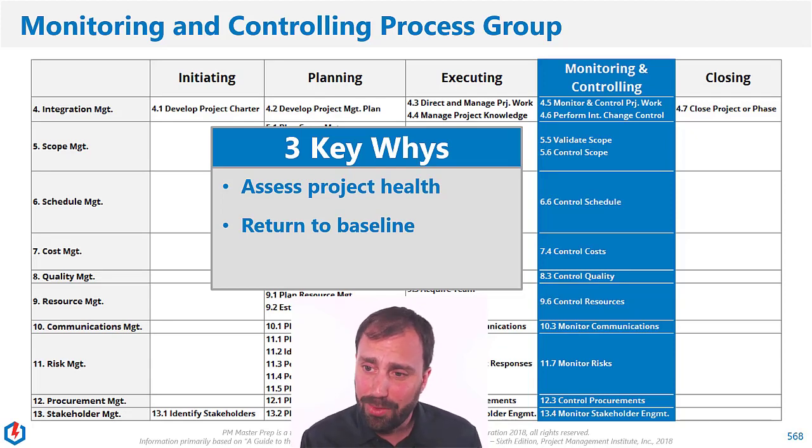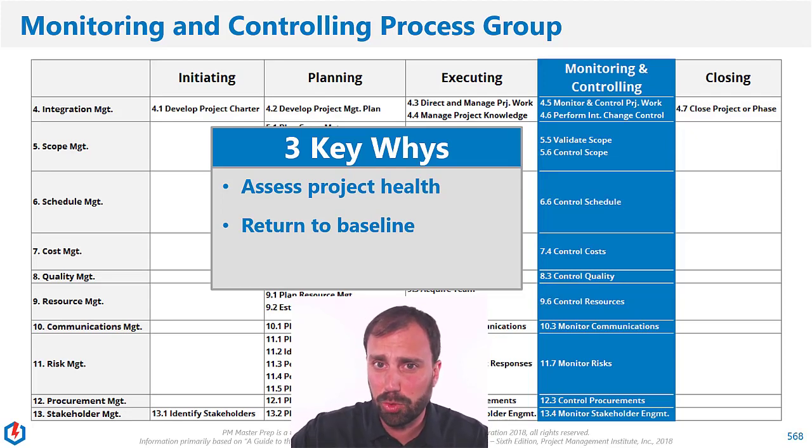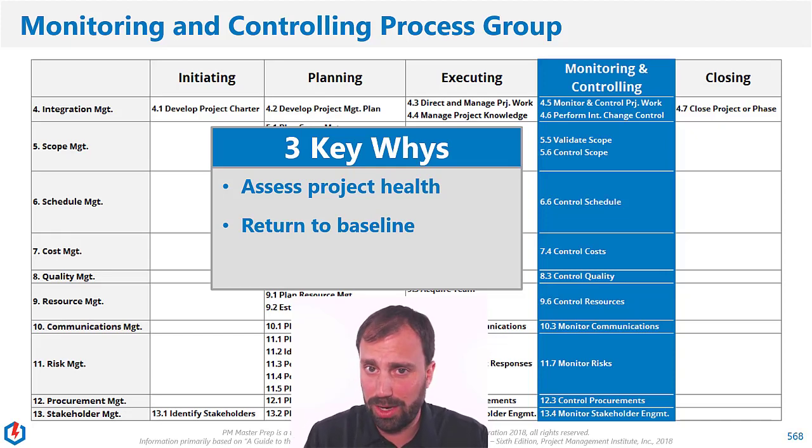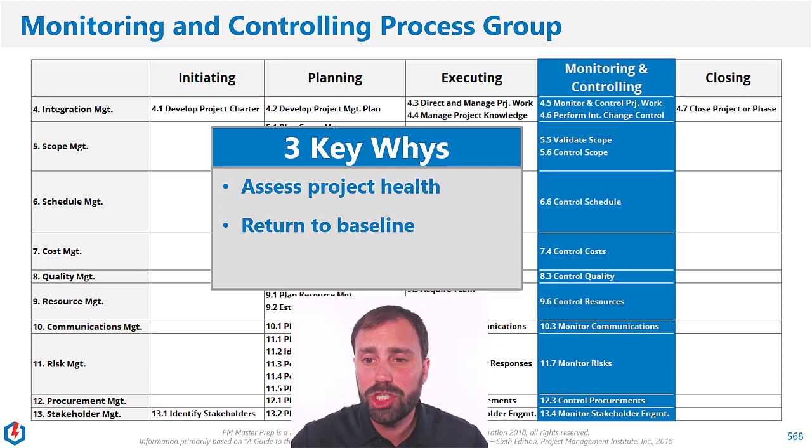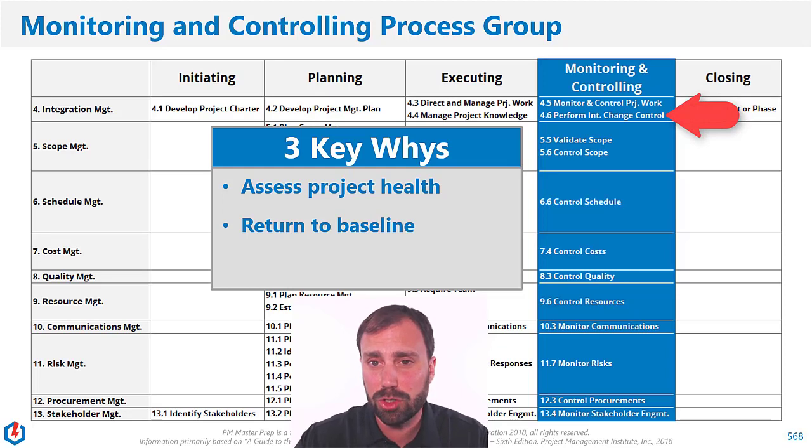That's where we said, hey, if we do what we need to do and we hit our process and our plan, we're going to hit our project based on a certain day, a certain cost, a certain scope output. We got to assess ourselves as we go through the project against that baseline. If we're off the baseline, in a negative sense, then we're going to have to make some adjustments, right? And those come in the form of change requests. And we're going to talk about that in the Perform Integrated Change Control process.